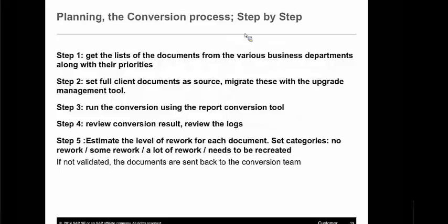But before we start actually doing any conversion, we strongly recommend you to start the planning process. Often what you see is that once you start converting, suddenly there's a lot more work to be done. You take an estimate, okay, we have 100 reports, and at the end of the week, I finally figure out, oh, there's a lot more than 100 reports. So if you didn't plan it properly, you're probably going to run over budget, over time, and so on. At the end, you only have unsatisfied end users.